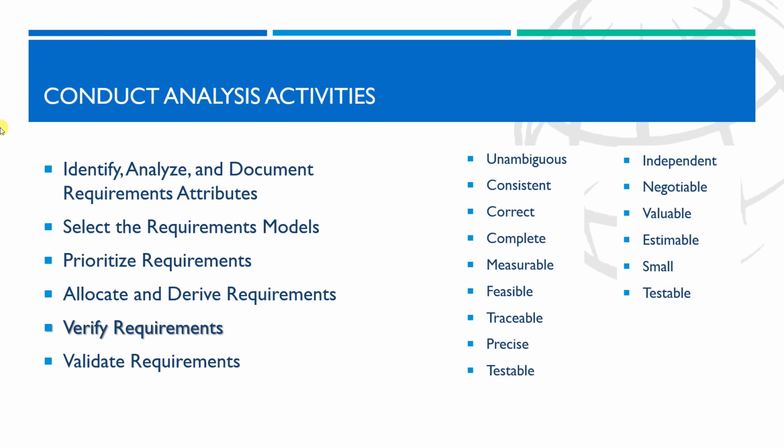When requirements are broadly defined, they should be progressively elaborated to a greater level of detail or decomposed into multiple discrete requirements to aid in the implementation of high-level requirements or to reduce ambiguity. This process results in derived requirements, which are important to confirm that the required functionality is present. It provides the basis for subsequent verification and validation.